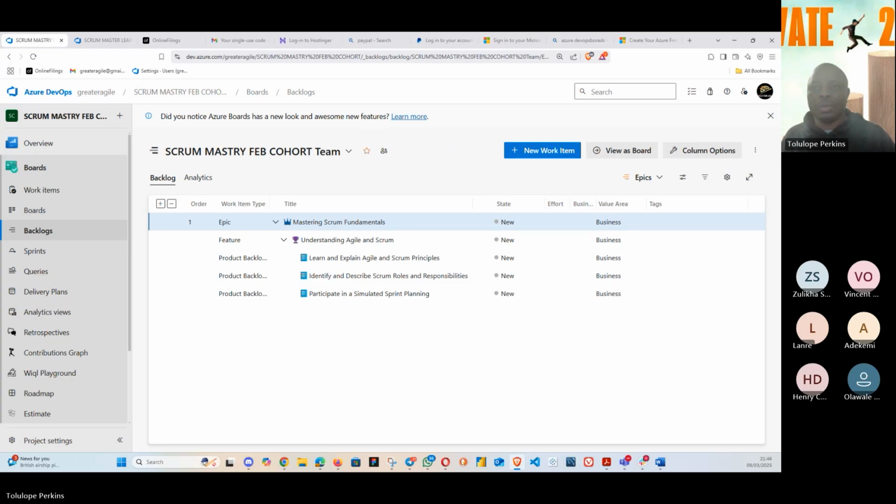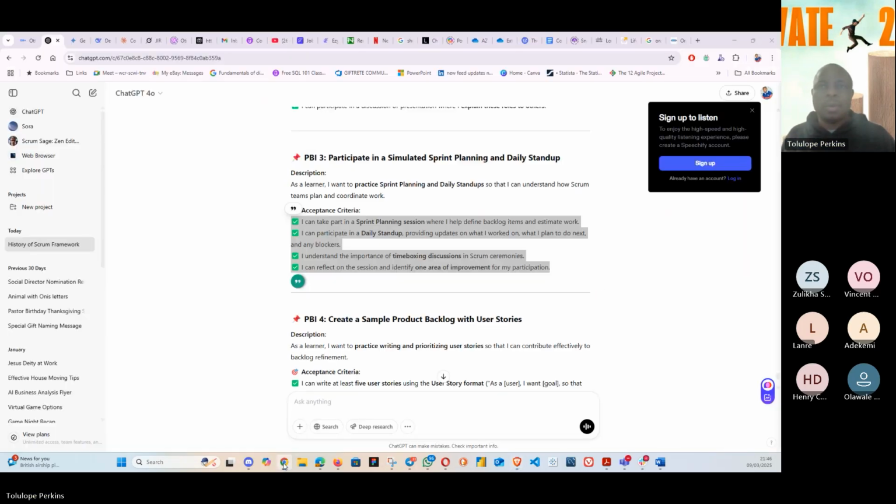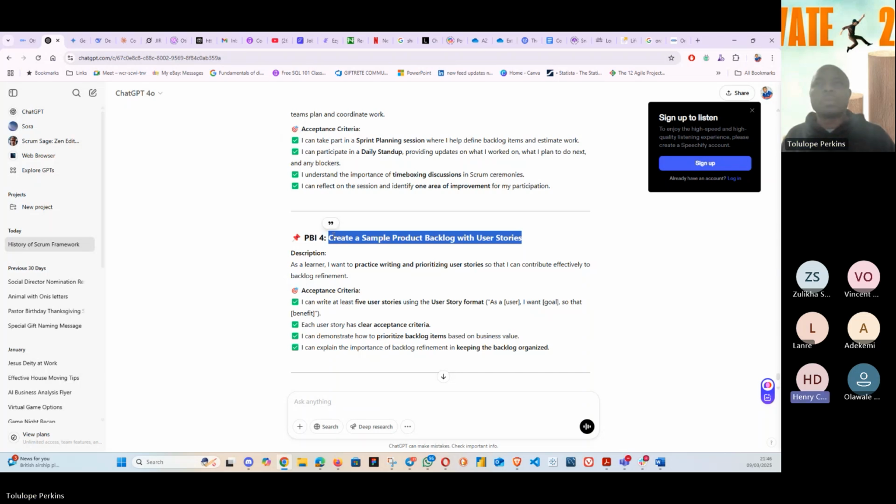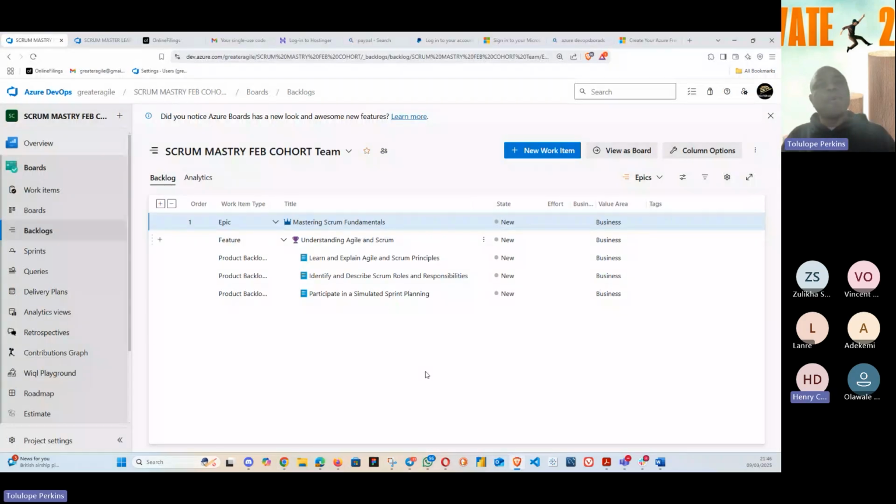Anybody? Apart from Larry. Larry should not go answer again. If I get your question clearly, is it the meaning of time box? Not the meaning. For a sprint of 2 weeks, what is the time box for the sprint planning? 4 hours. Thank you. So for a sprint of 2 weeks, our sprint planning has been time boxed to 4 hours.